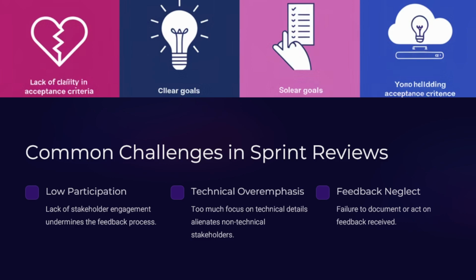There might be some challenges that you might face during the sprint review. Common challenges in sprint reviews include low stakeholder participation, which undermines the feedback process, an overemphasis on technical details that confuses the non-technical stakeholders, and failure to document or act on the feedback. These are the common challenges that you need to avoid. Addressing these challenges requires proactive planning and facilitation techniques.